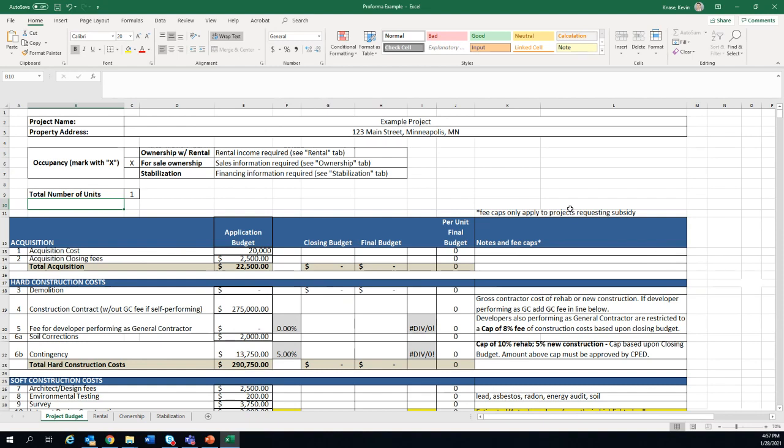There may be flexibility where you have to change up the site design as an example or something like that, that we can continue to move forward. But if there's significant changes, it may require going back to council for a change approval. And that's something we like to avoid if possible. So it's definitely recommended if you can to do that due diligence upfront ahead of time.